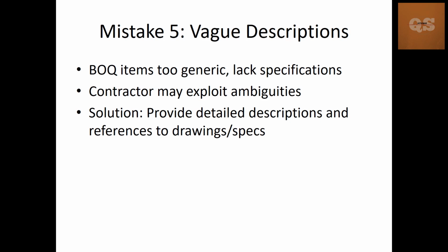If you don't mention that, the contractor can say, okay, you have not mentioned that it is as per this drawing and specification, so we didn't go through it. So we need more pricing, or more quantity, or a higher rate for this item. Such things can be avoided.